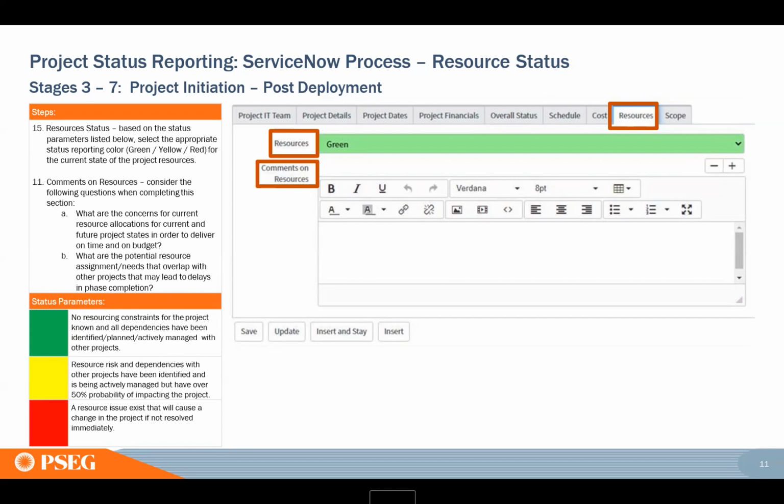So either they can prioritize your project up, or they can say, okay, we know you're doing everything you can. There's nothing you can do with the fact that we don't have anyone. We can't contract this particular skill set. Let's leave it yellow until we know if we're able to make these dates or not. So you have the right audience in those sessions to bring up resource issues, because these are the folks that own the resources, at least in IT, or may have the relationships with the business that owns the resources in other areas that you need. So I would say definitely take the opportunity to voice if you have resource constraints or resource concerns in your status report.